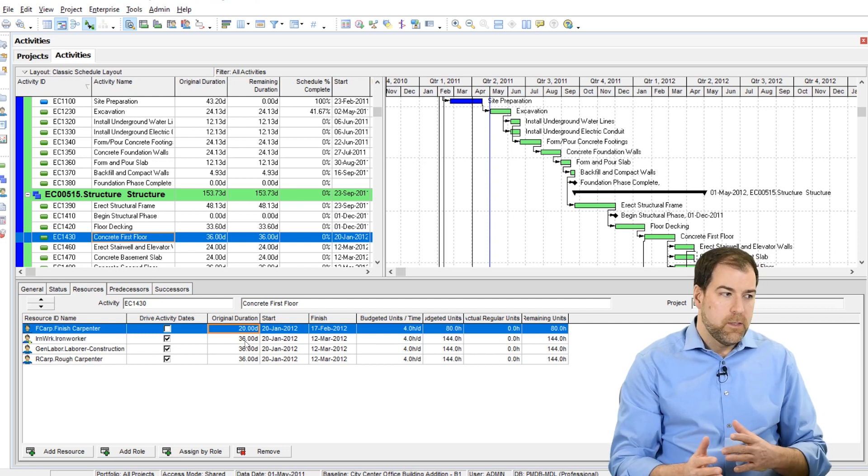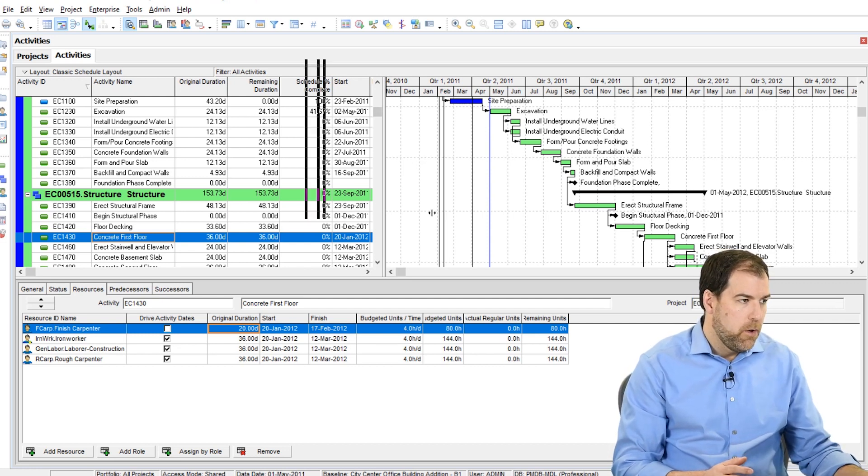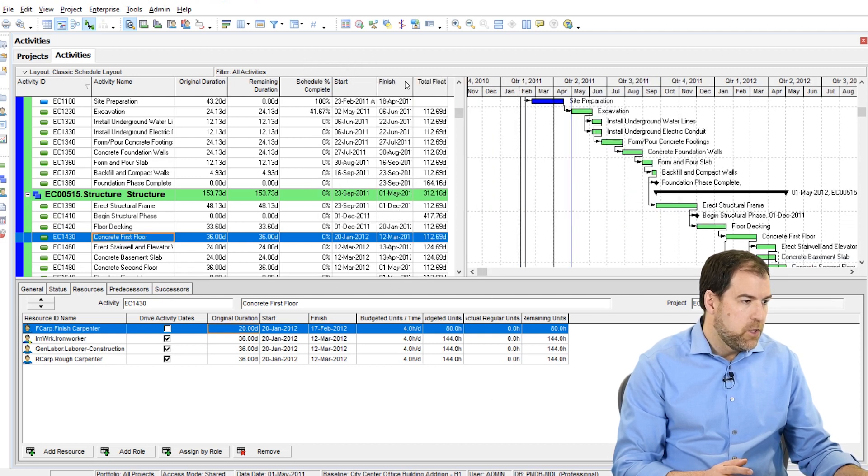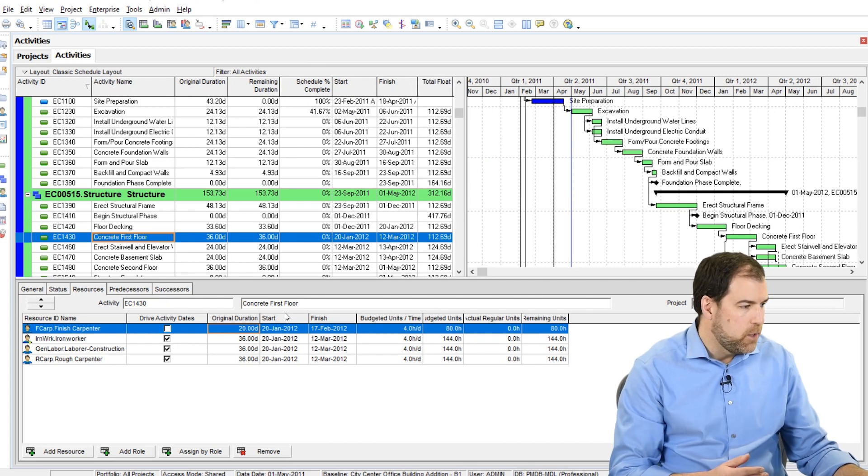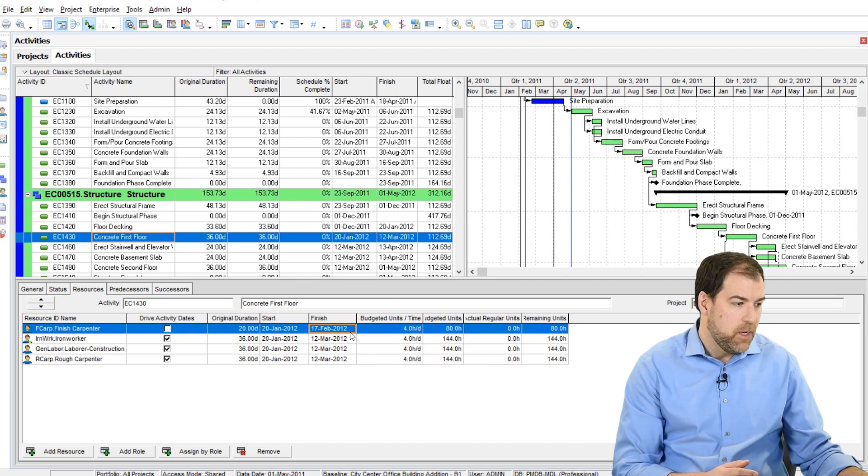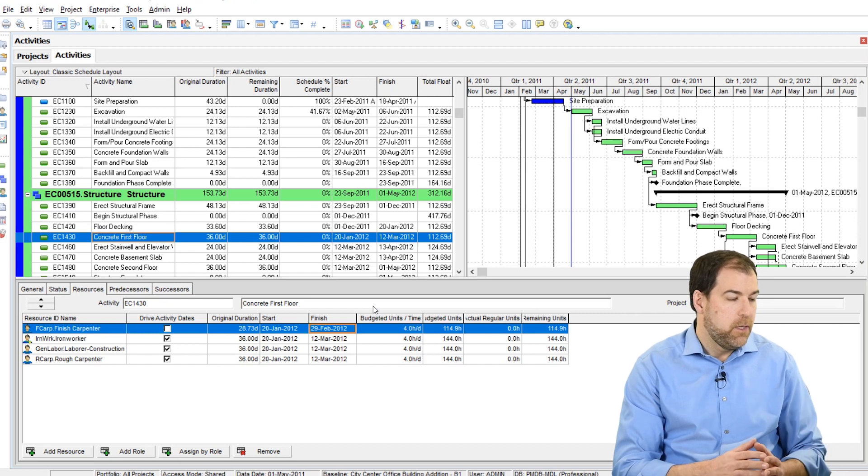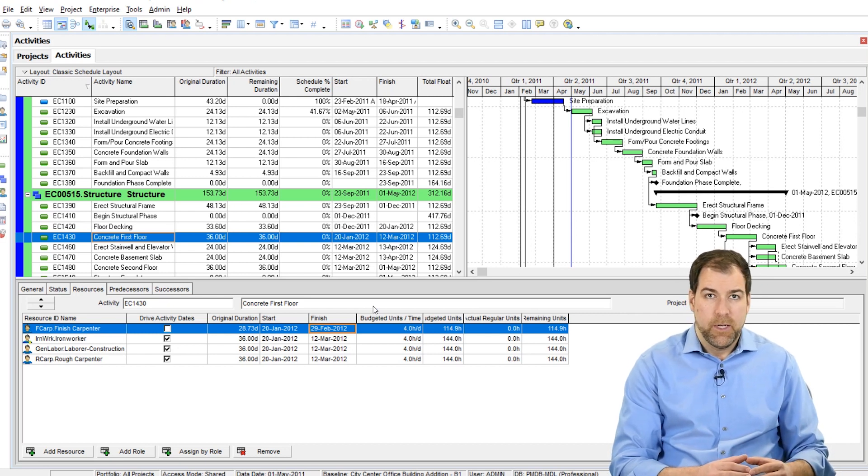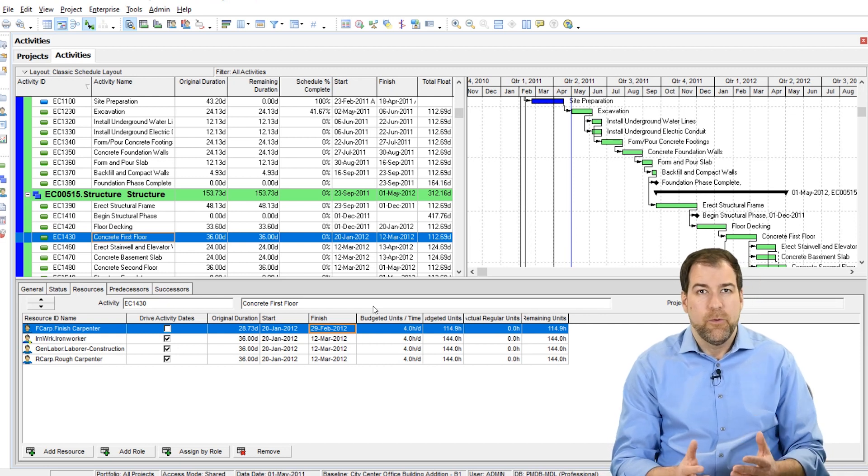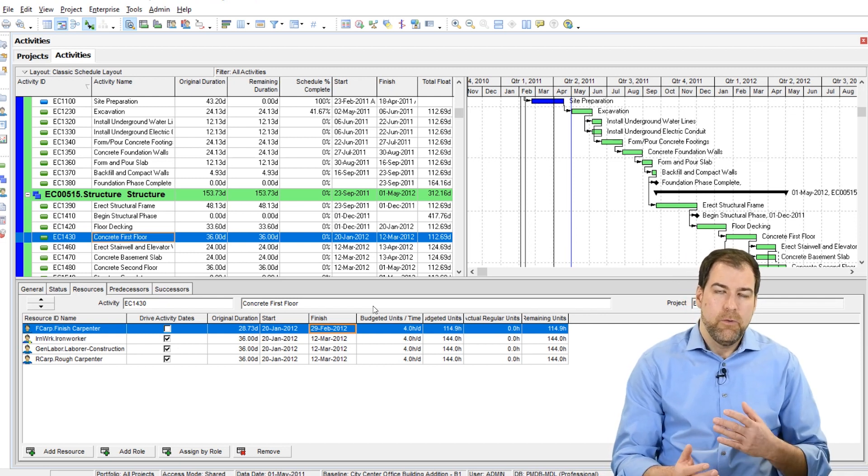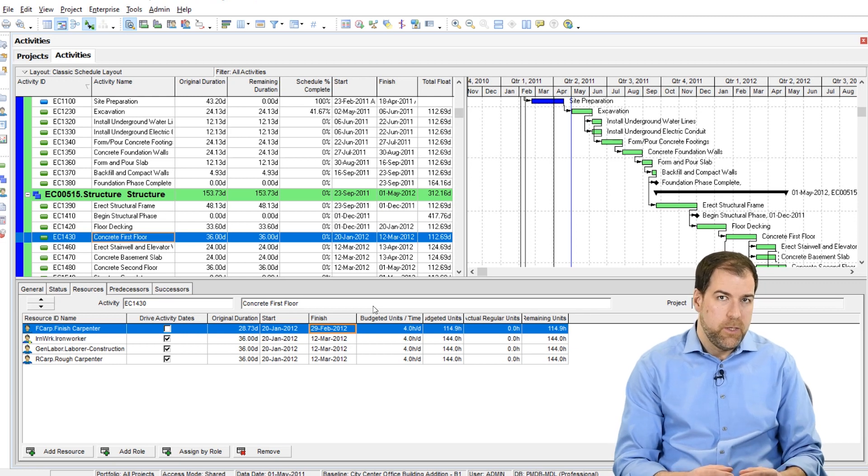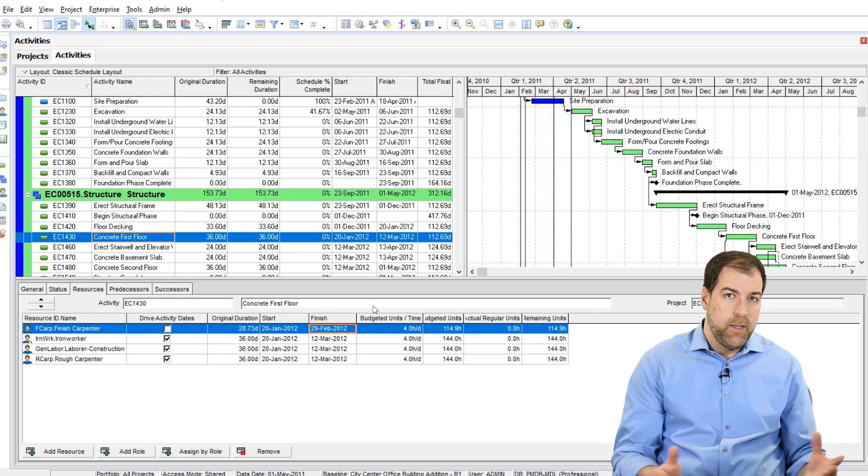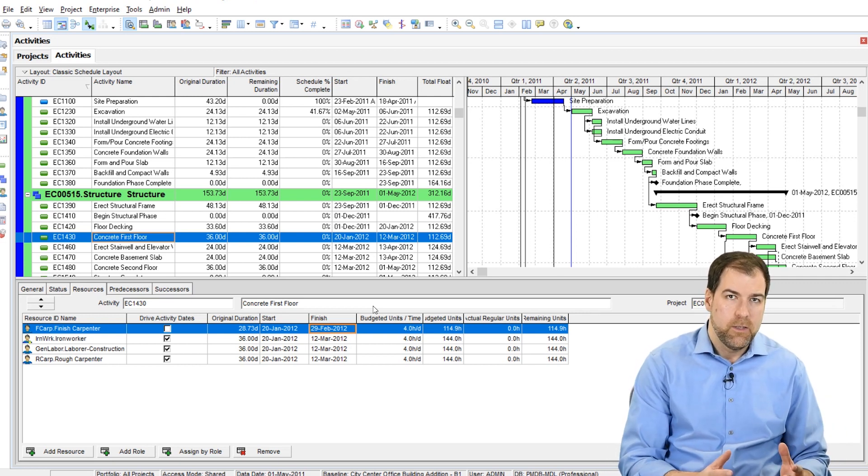And the other thing that's unlinked is if we expand here and show the start and finish dates, you'll see that I'm starting on January 20th and ending on March 12th. Again, it's an old project. But I can actually end this assignment outside of the activity's dates as well. So the resource assignment can be outside of the activity dates. This is kind of weird. So I'm not sure why we would want a resource assignment to be working on an activity but outside the activity's duration or outside the activity's dates.